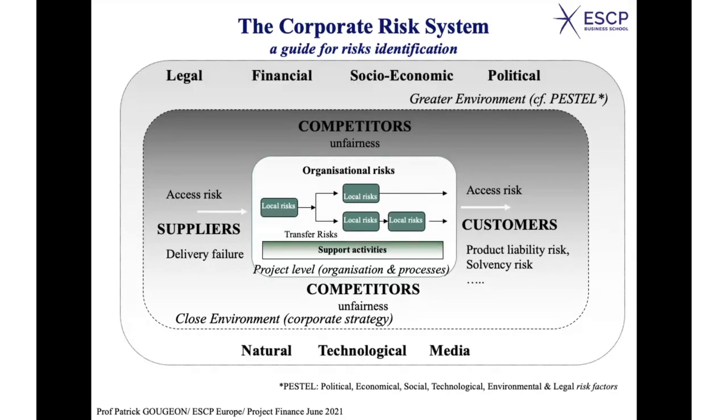Okay, for instance, you have a legal risk. Why? You may have new regulations that would impose some additional cost to your project. You may have deterioration of financial conditions, so that you might have difficulties. For instance, you may have the foreign exchange risk. You know, if your cash flows are in dollars, but your home currency is the euro, well, you may have a volatility of the exchange rates, and you have no control on it.